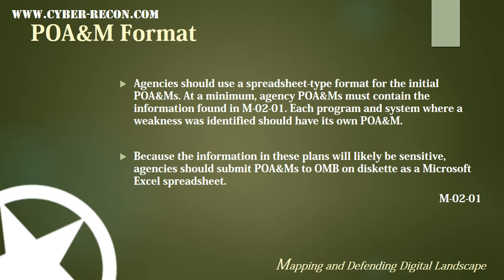The format of the POAM is important as well. OMB has determined that agencies should use a spreadsheet-type format for the initial POAMs, and at a minimum, these agencies' POAMs must contain the information found in M-02-01. Each program and system and common control set where a weakness was identified should have its own POAM. And because the information in these plans will be sensitive, agencies should submit the POAMs to OMB on a disk in a format like Microsoft Excel.